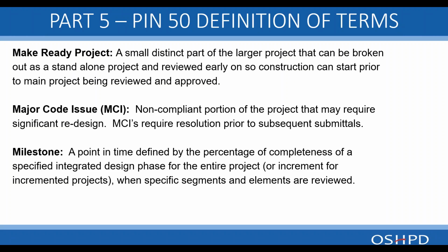A milestone is merely a point in time defined by the percentage of completeness of a specified integrated design phase, as we talked about earlier. For example, implementation documents, a milestone would be 50% complete of implementation documents.